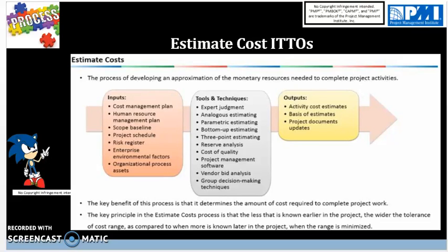So for instance, if you're building a house, let's say in South Dallas, and you will build a condo in Coppell, then you would need to take estimates from the previous project and use that as a basis to estimate. And it's not going to be perfect, but it will get you in the ballpark.